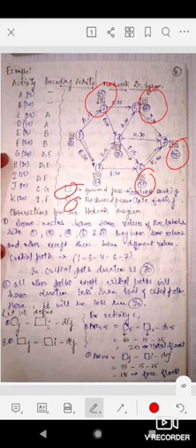Forward pass means when we are moving from node 1 towards node 7. The value in the square represents the earliest start time of that activity. I will tell you later what that is. And the circle represents the backward pass. Backward pass means when you move from node 7 back to node 1. So it is a backward pass.